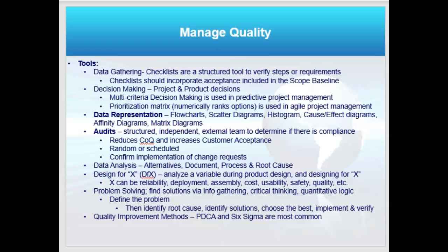And I could do problem solving. I love problem solving, where they define the problem and then they talk about the root cause, identify solutions, choose the best one, implement it, and test it, verify it, right? That's a good process to memorize. Great test question.